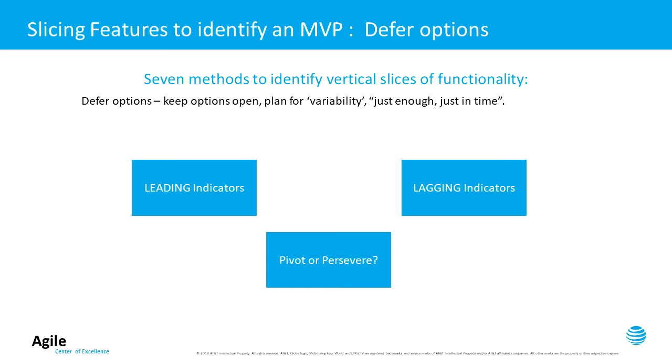For instance, if the functionality that's requested includes multiple options, separate these options or optional behaviors into unique features that could be added later once that core functionality is delivered. If you're manufacturing plastic bottles, you need a bottle with a cap, certainly, but do you need to decide up front the cap style, the labels, the color of the bottle? If you're building a vehicle, certainly you need seats, but is it important for your MVP to decide on the upholstery or the shapes of the seats? Maybe just a core basic seat is all that's necessary for that first deployment.